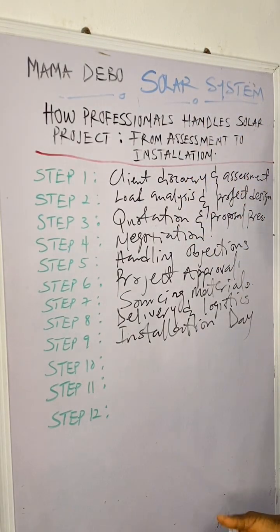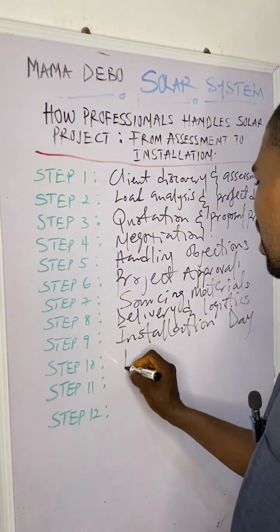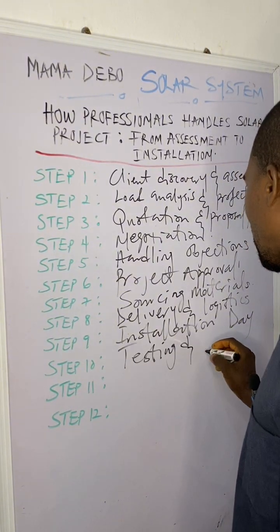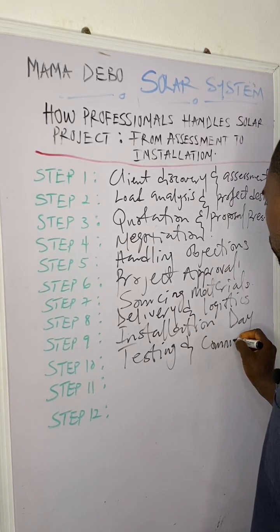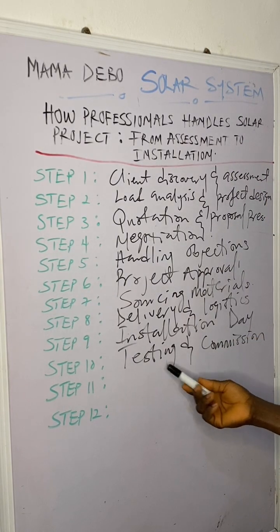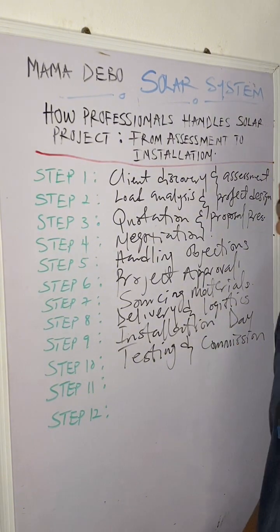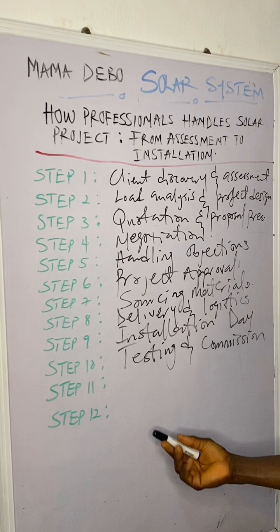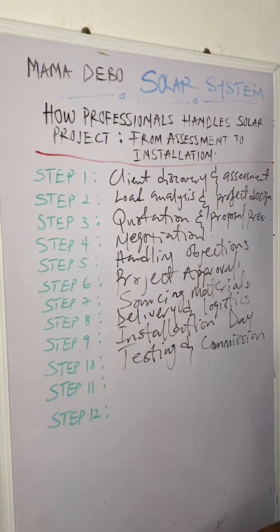Installation day. After installation day, then testing and commissioning. That's the next step. During your installation day, you might not finish your installation on the first day, you might not finish it on the second day. But after your installation day, then you test and you commission.